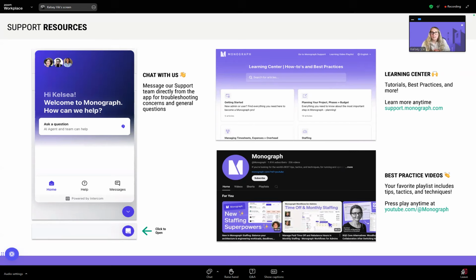Tessa, I am not sure who your launch manager is. I need to look at this list that I have behind me here. Okay, you are with AJ. Fabulous. I will talk with AJ and have him send you some more information on entering that past data. But just as a starting point with the project section we were talking about today, if you do want to bring in past phases, it's the same process, you just retroactively put that date in. You won't see it necessarily on your Gantt chart unless you're scrolling backwards, but you can backdate it so you have that full contract entered in there. I'll make sure that AJ gets some additional details there.